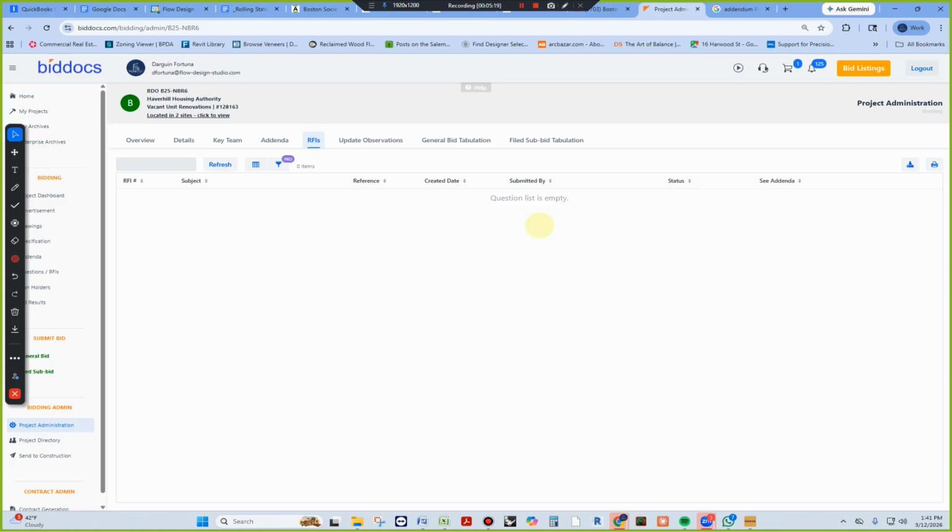When it is born out of the internal design team is one thing. When it's born out of contractors' questions is another thing. So the internal team is everybody that's working with you from the beginning to the end of the design process. In this case, this is being initiated technically by our asbestos consultant, so it will not be an RFI. But if it is initiated by anybody outside of the design team or the entities, owner, architect, groups, then it's typically by RFI. So we're going to do an addenda.